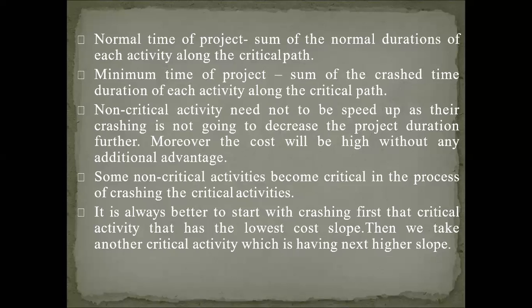And one more thing we have to keep in our mind regarding non-critical activity. Non-critical activity need not be speeded up, as their crashing is not going to decrease the project duration further. Moreover, the cost will be high without any additional advantage. Okay, so cost is high without any additional advantage.